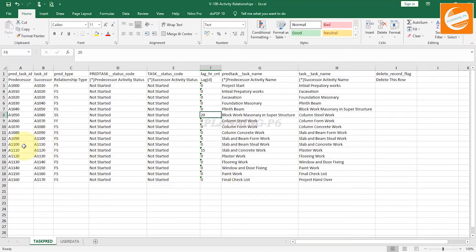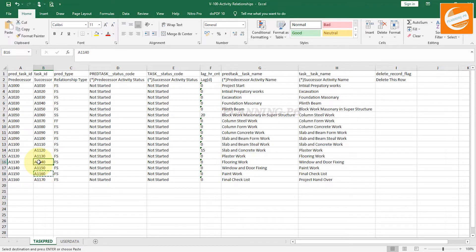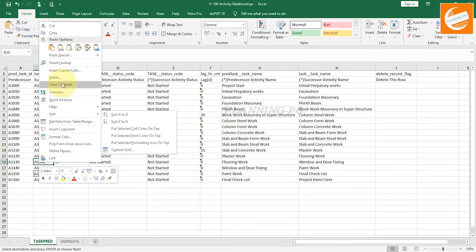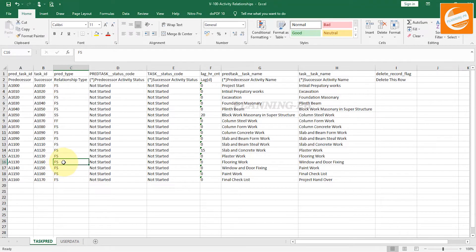Now we will change the successor of another activity. If you change a predecessor, the successor of the previous predecessor is automatically changed as well — I will show you this in Primavera. Multiple relationships will be assigned this way. Copy the new successor value and paste special as Values.